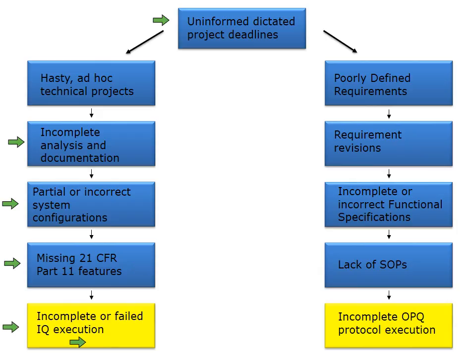And we often find delays in IQ and OQ executions due to these issues because of lack of documentation, SOPs, etc., on the system development, environment management, change control, you name it, data migration, and ongoing data integration management.